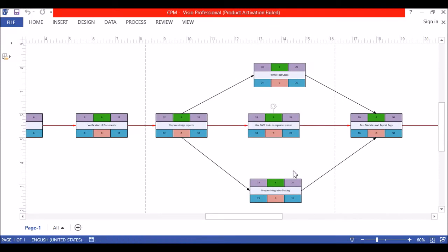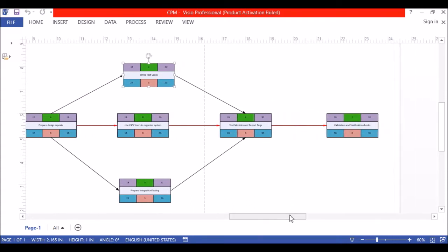And as you can see in these 3 tasks, this is where you see the change. 18 from 24 is 6, so you have 6 days here as slack time. 18 from 18 is 0, you have no days here, and 18 from 23 is 5, so you also have 5 days here, and the rest is 0.